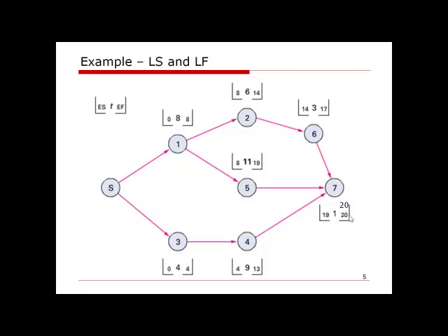So the late start time will be week 19, because we need to start in week 19 and it takes 1 week to finish it, so we can finish it in week 20. And then we move backward. Activities 4, 5, 6 are the activities immediately before activity 7.